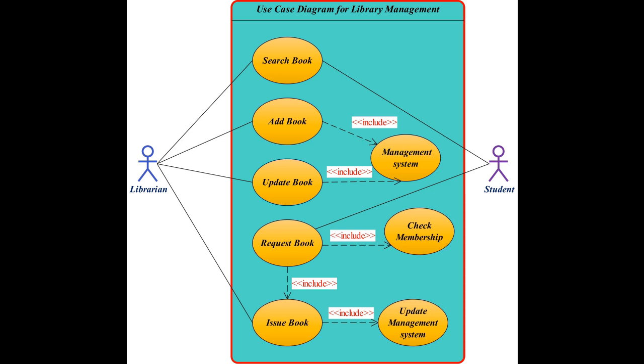I remember one project, the devs assumed an external payment gateway was their problem to build reconciliation for. Big argument. But the use case diagram clearly showed that gateway as an external actor. Outside the box. Instantly clarified. Not our build, not our scope for that bit. Saved a lot of time and grief, I bet. Huge amounts. It prevents those massive misunderstandings about what you're actually delivering.